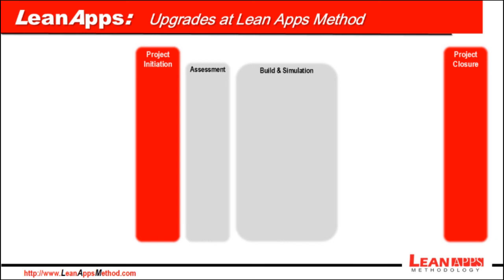Second phase is build and simulation, where we build any new customizations as few as possible, update the old customizations that will be migrated to the new version, perform the upgrade simulations, and test the entire new system version. Third phase is transition, where we train users in the new navigability, perform user validation tests, convert all custom menus and responsibilities, deploy all updated custom objects that will continue in the new release, and finally upgrade to production.